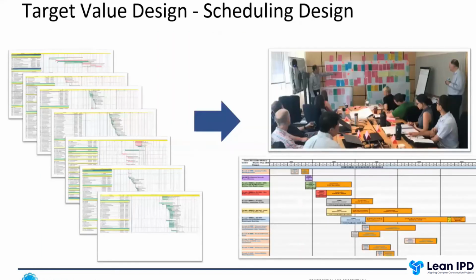So from an actual coordination point of view, we found that once the team has ownership of the design and all of the coordinating, the other thing I should say is that in this contract model, errors and omissions and traditional things that build teams would get change orders for are not change orders. They do not increase the contract value. So everybody has a lot more buy-in to get all of the final details worked out.